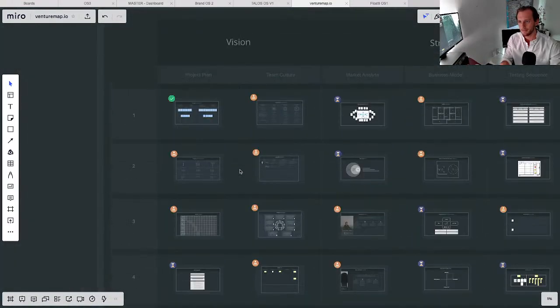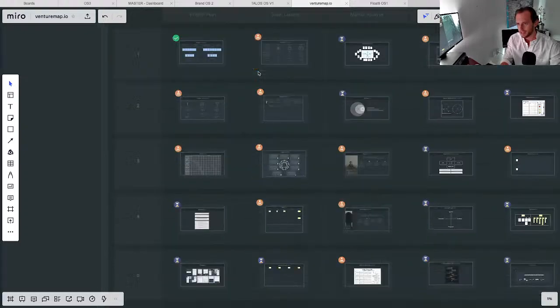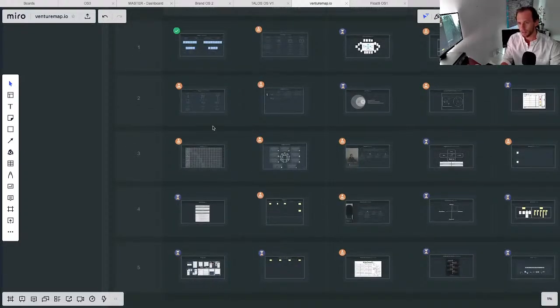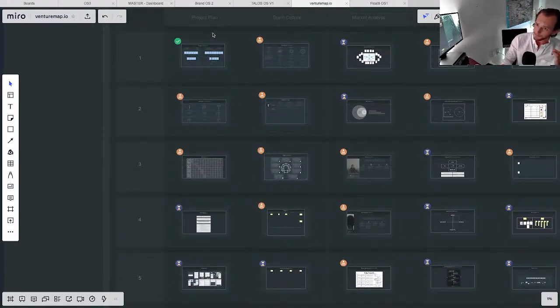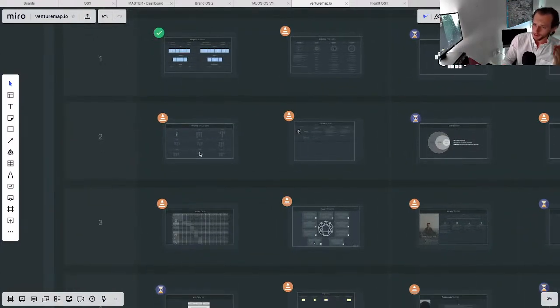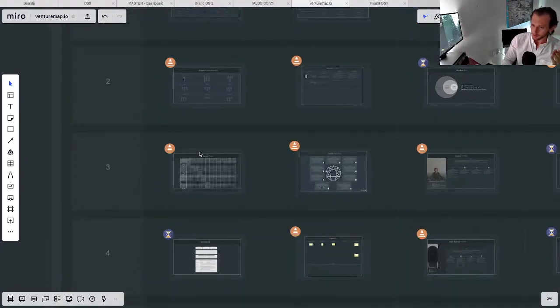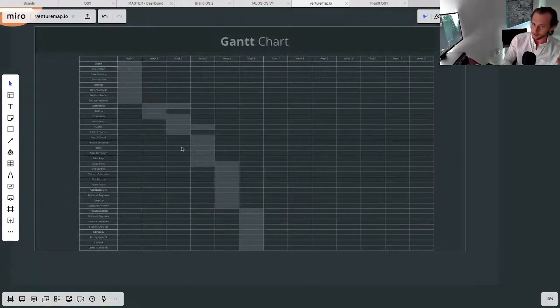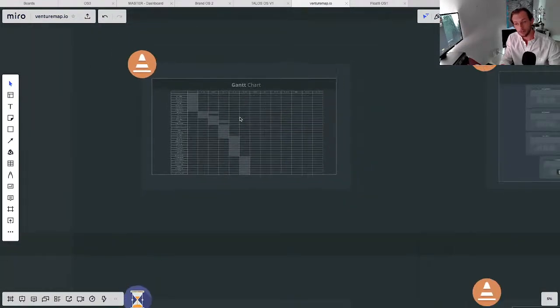So if we're looking at a vision pillar alone, core deliverables that'll really be meaningful are the scope statement, work breakdown structure, and Gantt chart. And again, a Gantt chart can look like this, and it's basically saying we know what we have to do. Now let's define when it's going to be done by, and that's how you find ultimately your milestones.